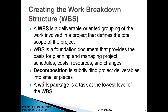Creating a work breakdown structure involves doing something called decomposition — taking a scope and breaking it down into smaller parts. You keep breaking it down until at the lowest level you have the so-called work packages. A work package is a task at the lowest level of the work breakdown structure — those are specific, actionable items.